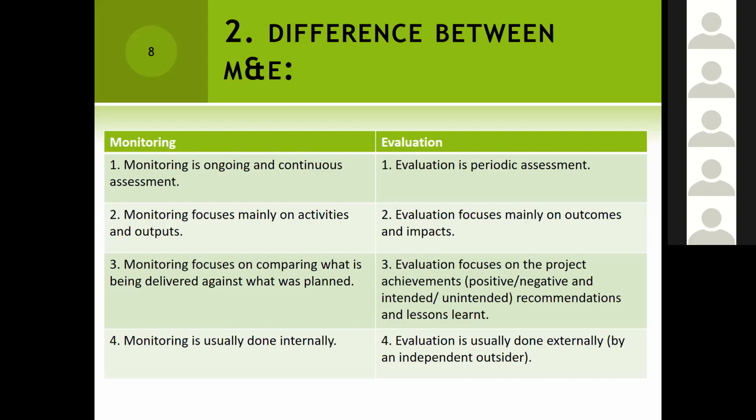Now, one, we said monitoring is always ongoing and continuous, and this is very different from evaluation, because evaluation is periodic assessment. So it's not something we do on a regular or continuous basis in a particular project.